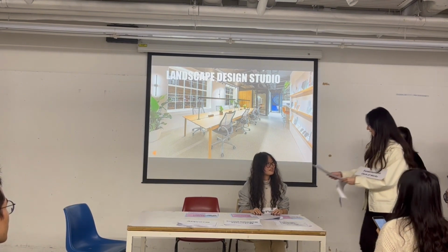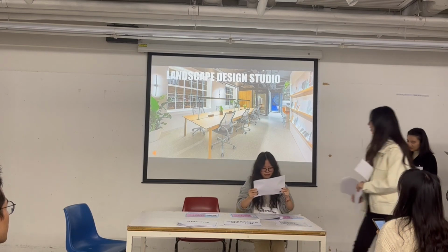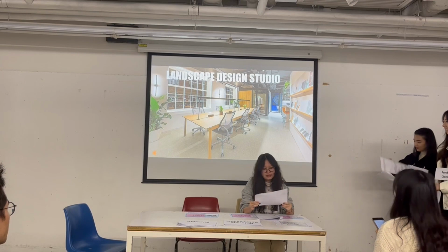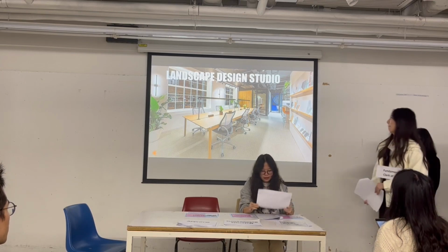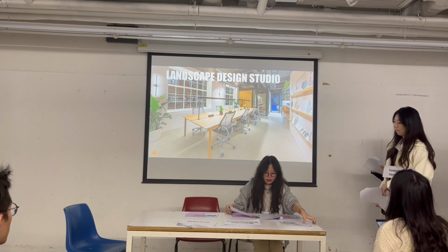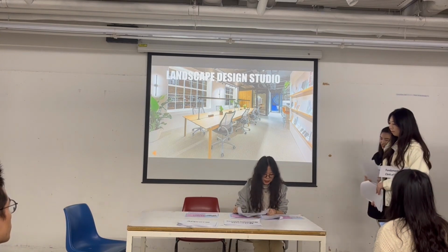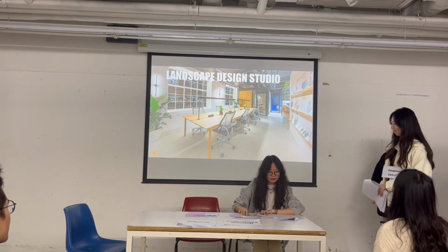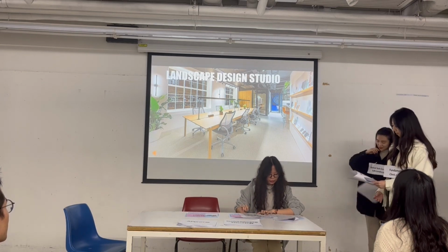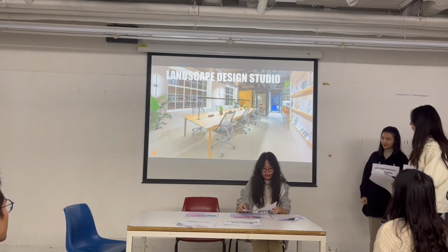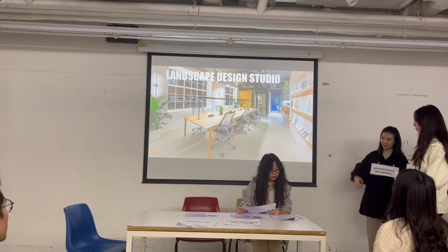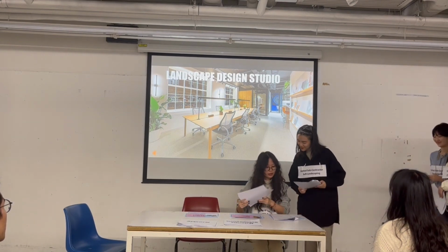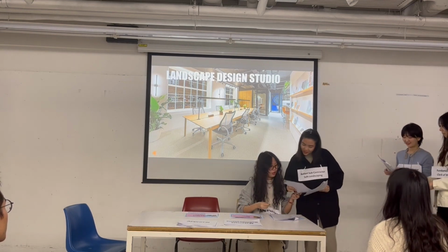Come in, please. Here's the RFI. Thank you for bringing this to our attention. I will redraw the drawings to accommodate the structure. This will result in a variation to the original plan. This is the redrawn plan and the structure.